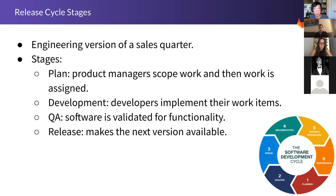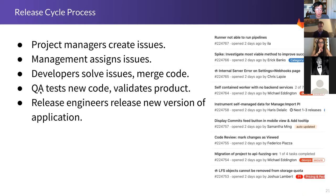Stage two of the software development cycle: developers work on implementing the planned features. After that, quality assurance engineers make sure it works. Then a release team makes the next version of the software available — this is a really big event, and everyone can breathe a sigh of relief. One important thing: the amount of stress in engineering teams basically ratchets up as you get closer to a release date, because the vast majority of engineering projects are late.